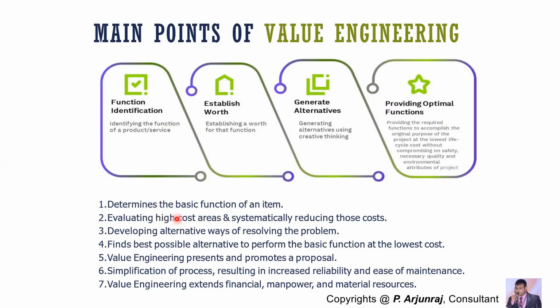And you have to understand the individual cost. When you take a motor, you have rotor, stator, coil, winding. You have to understand the various costs for each individual part. And you also need to identify the cost from high to low. And also you can evaluate how you can reduce those costs. Not just reducing the cost, but how you can optimize the cost. When you optimize the cost, you can use this technique, or the third point I was telling.